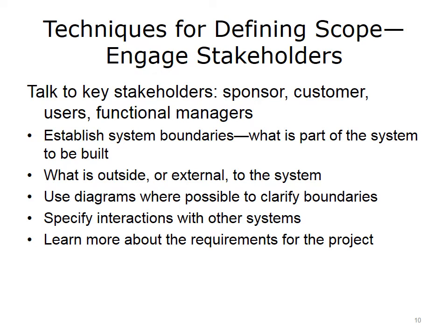In healthcare IT projects, knowing that a particular clinic or unit is in or out of scope is an example. Another example is that certain clinical documents are in scope while others are waiting for a second phase to go live. Be sure to consider how clinicians will accommodate this. Also, healthcare IT projects use vendor solutions or, as they say, off-the-shelf products. Be sure to understand what can be customized and what cannot. This will help you define the scope of your project and elicit requirements.